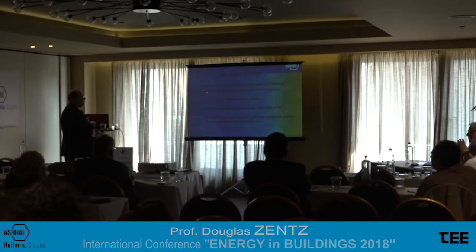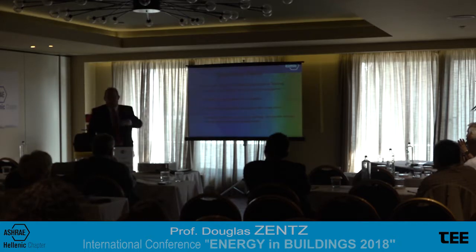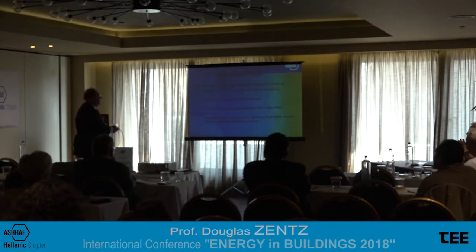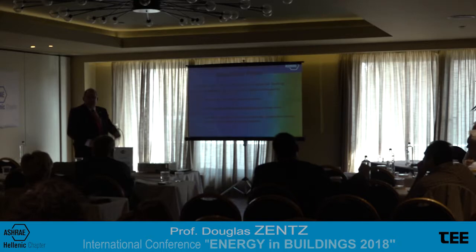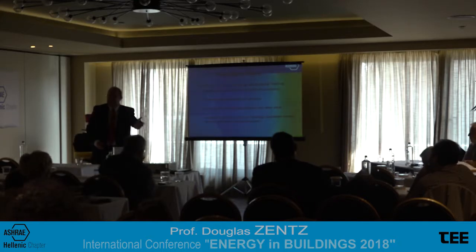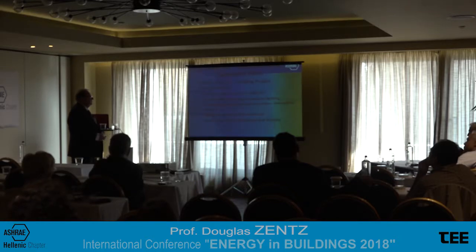Building acceptance testing. Okay, some people might call this commissioning. It's more than commissioning. And in this standard, you're saying basically this needs to start earlier. This needs to start in the design process. And it continues. And it's looking at everything, not just what you might have a commissioning contractor look at. It's involving everything in the building.